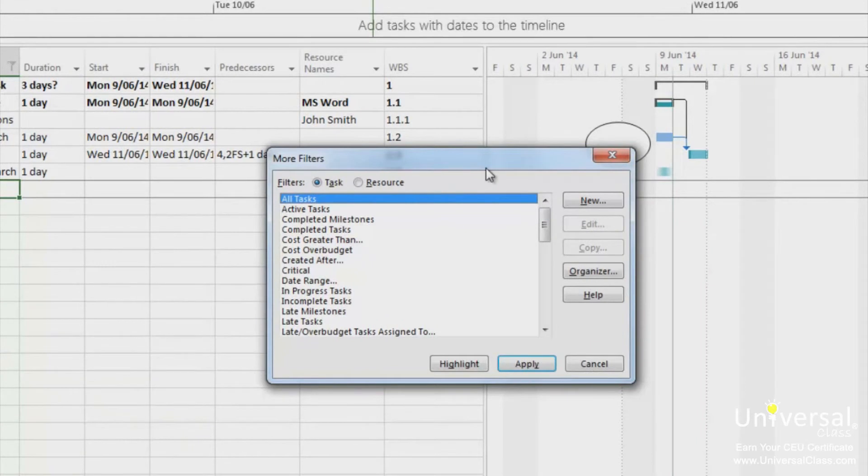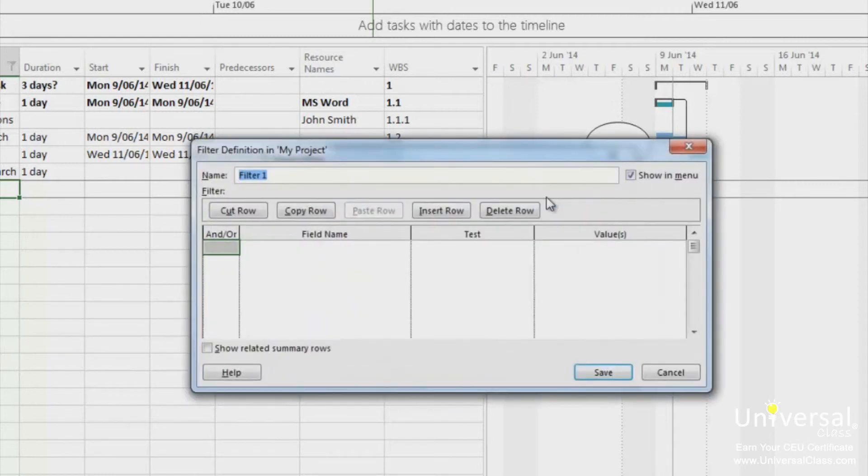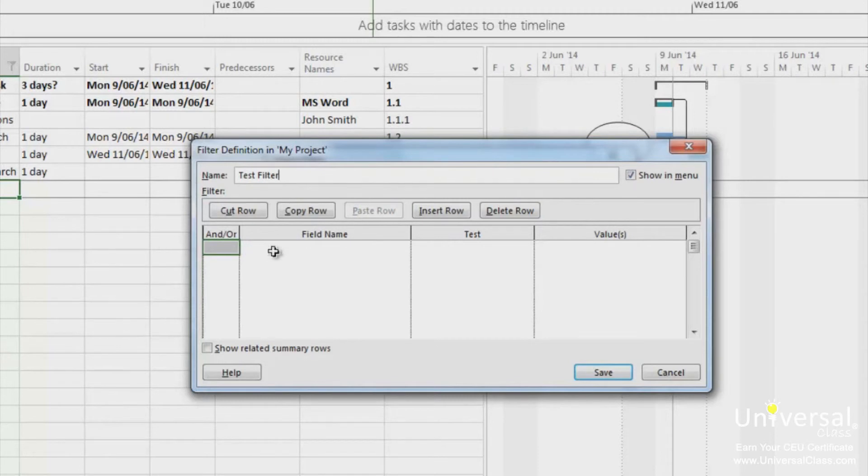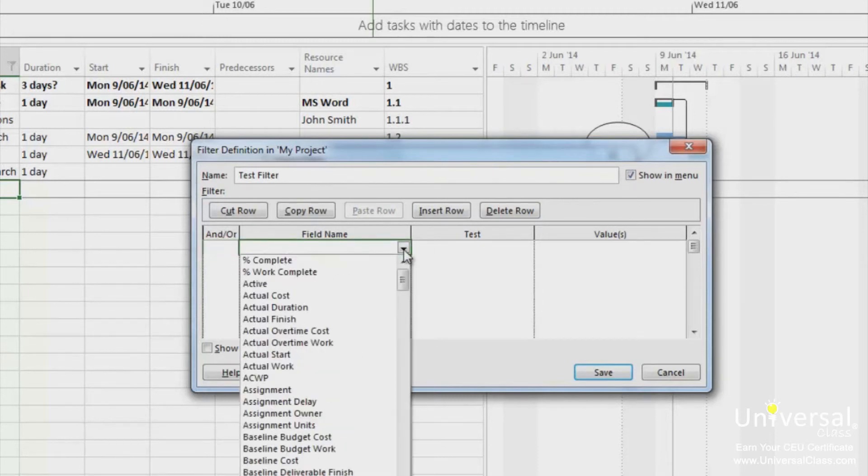Choose either the task or resource to let project know which list of filters that you want to include your new filter in. Click the new button. Type a name for the filter in the name field. Click the first line of the field name. Then click the down arrow to display your list of choices. Click a field name to select it.